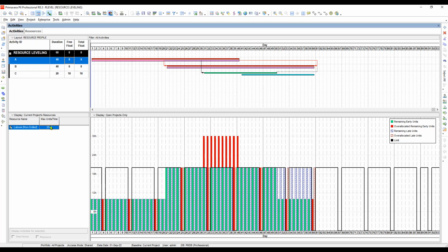The available units are 20, and utilizing the 10 in here is already sufficient to complete this activity. But if we add one more here, that is not practical, because you are putting 20 units per day while only 10 units per day is required, right?